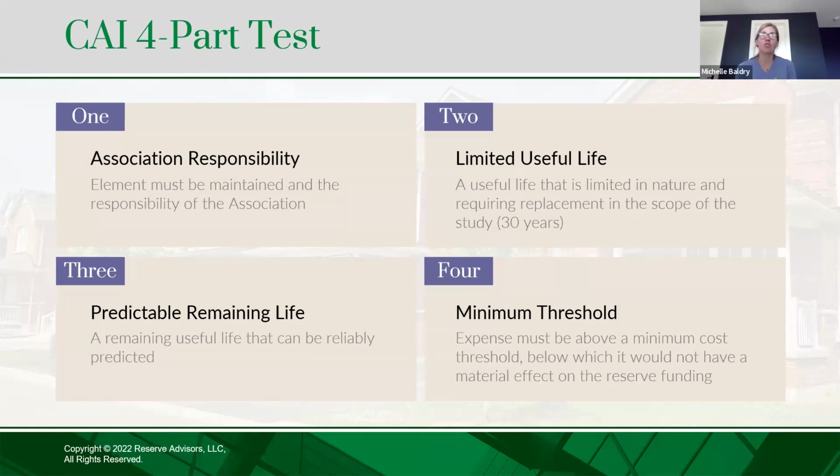No problem. So developer reserve studies, or reserve studies from plans, are something that we're starting to see happen more commonly. So there are different levels of a reserve study. A level 1 is a full reserve study with a site inspection. So a community already exists, performing that site inspection and reserve study from scratch. A level 2 update is when you've had a reserve study, and it's updating that current reserve study with a site inspection, but reusing that inventory and the quantification.